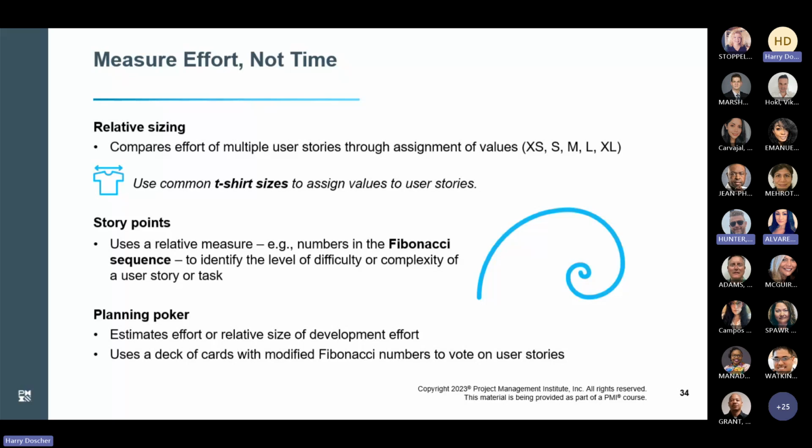The thing is, planning poker is a way of communicating. Each person picks a card that they feel represents the effort for that particular item, and when you say 5, 4, 3, 2, 1, you turn them over. So there are times where you may have someone who is new to the team who thinks an effort is either extremely high or extremely low.